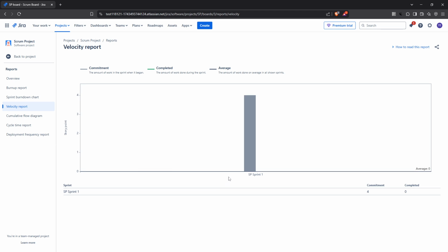To calculate your team's velocity, observe the story points completed over several sprints. For example, if your team has achieved 17.5, 13.5, 38.5, 18, 33 and 28 story points over 6 sprints, you would add these up and divide by 6. In this case, the velocity would be 24.75 story points per sprint.